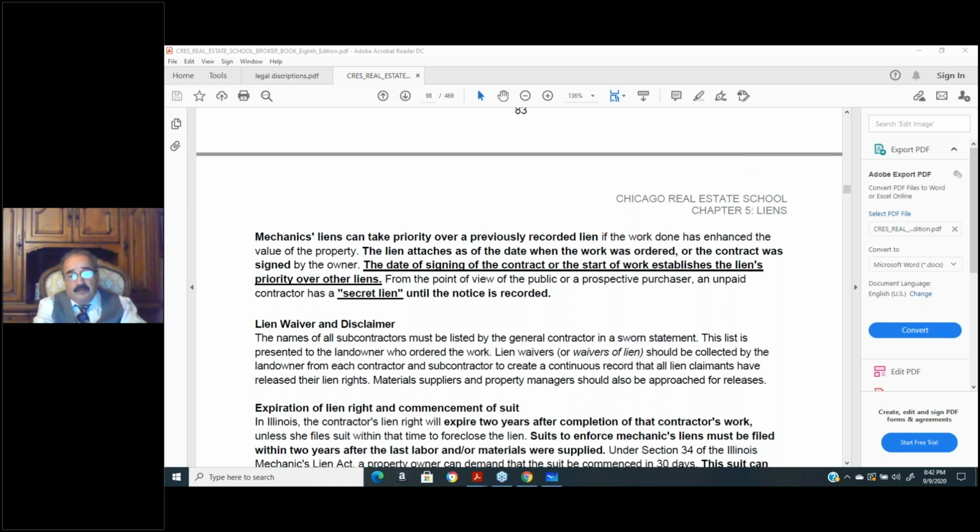And you know what's the worst thing about it? When you pull a permit, then you have to say I'm doing an addition on a house. So I'm running plumbing and electrical and everything else. Well, before I can put up the drywall, I have to wait for the electrical inspector to come in to make sure that the wiring is fine. I have to wait for the plumbing inspector to come in. And if they don't always show up on time or they forget the appointment and you got workers there, you can't do any work because you're waiting for the inspector to come in.